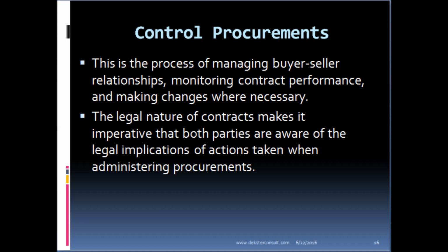And remember that the legal nature of contracts makes it imperative that both parties are aware of the legal implications of actions taken when administering procurements. One party cannot alter the terms and conditions of a contract. A contract could only be modified mutually by the agreement of both parties.